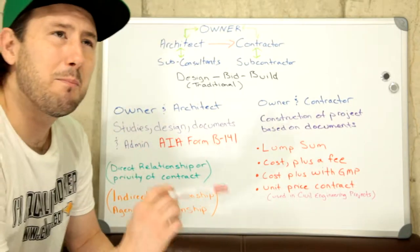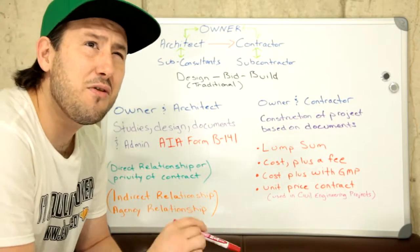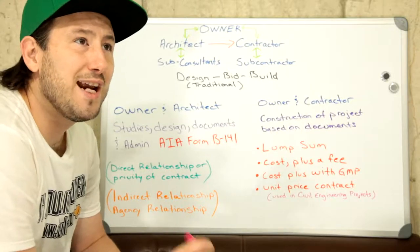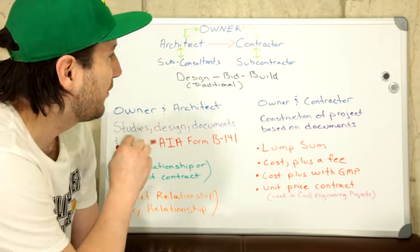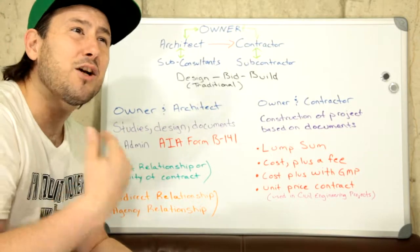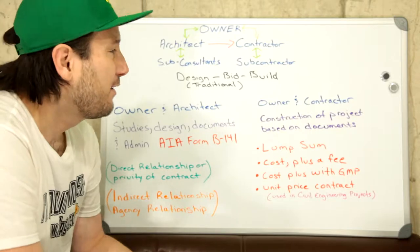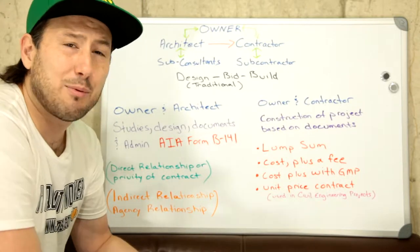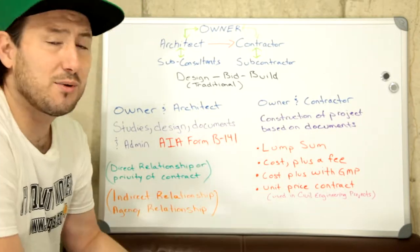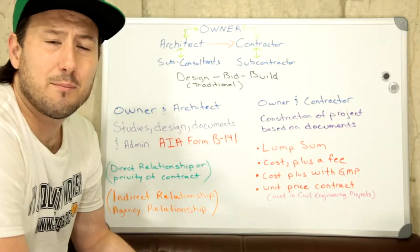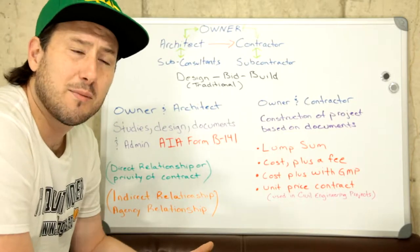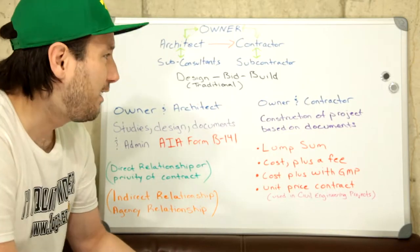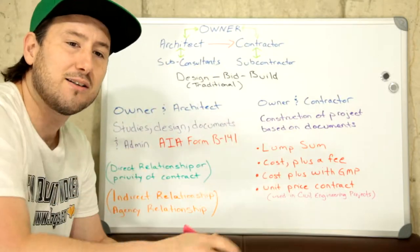During the Miller Act of 1935, a lot of things changed. That made it so that contractors, if the build was over $100,000 on capital projects, would have to get what's called a bid bond, a performance bond, and a labor and materials bond — which we will be getting into much further down the line.